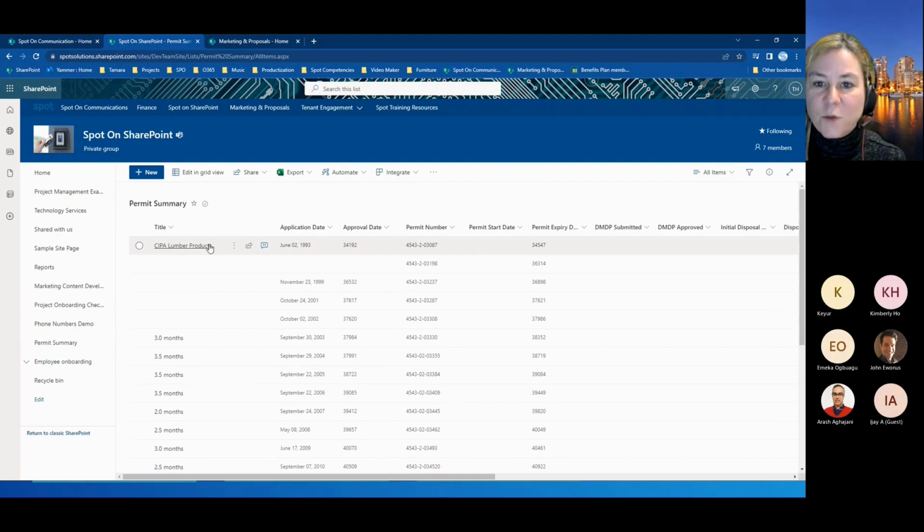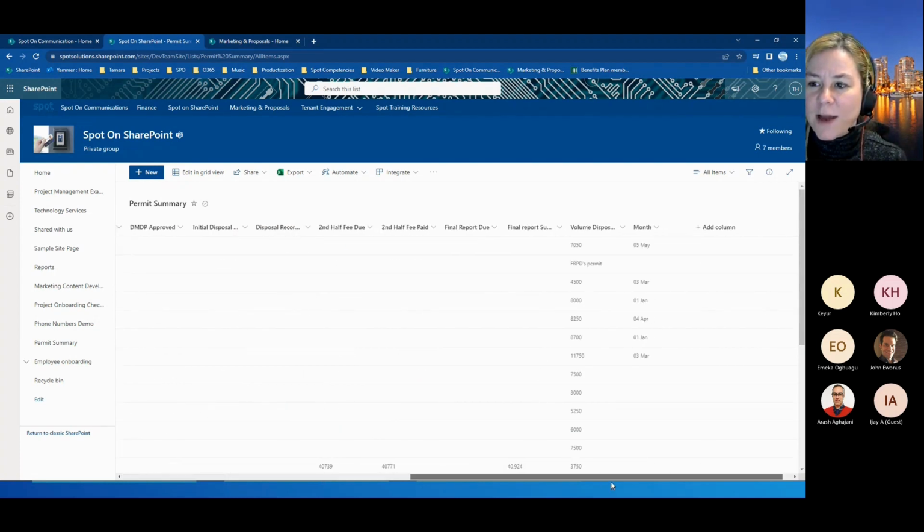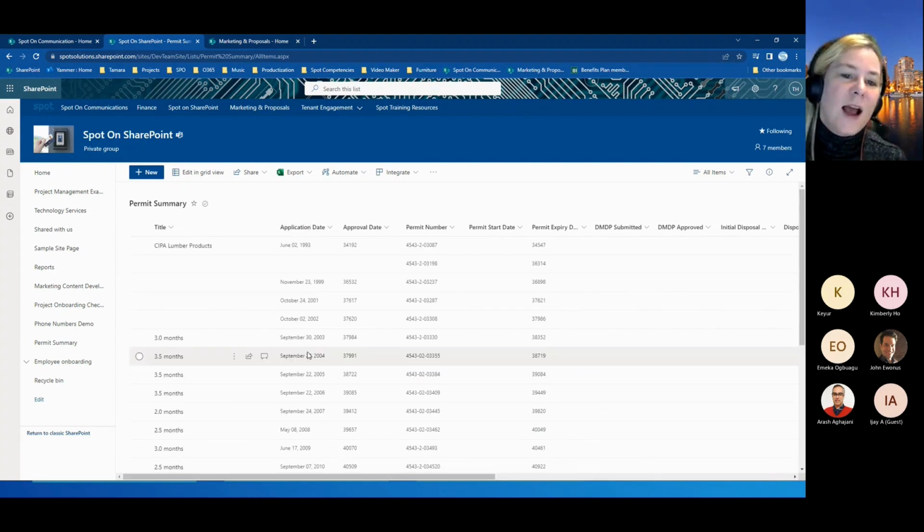You can have all of your permitting, for example, and this is one of the things that they were tracking within the environment, being able to say, when did I get my permit for each permit and when is that permit due, and having workflows that help us to identify and notify somebody in advance that something is coming, that we have something new that we need to do and something new that we need to look at.